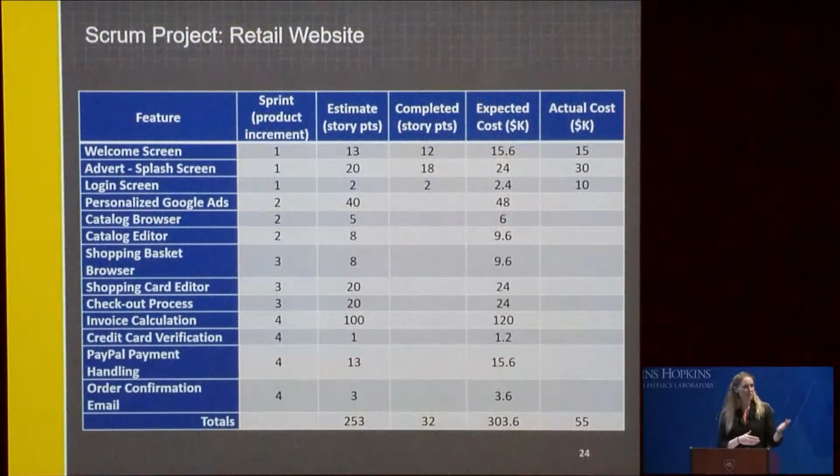Yeah, no, absolutely. And I think I mentioned this, but it's rolling wave planning, right? So I'm constantly taking the information from my sprint retrospective and I'm using that to influence my next sprint, or influence my next release and how I can do that better. So in this particular example, and I apologize, we only walked through one increment, but if I had walked through two or three increments, you would have seen that over time, I'm identifying a trend, I need to make an adjustment. Maybe my estimates are wrong, maybe I didn't give myself enough time, maybe that job is more complex, and you would see those numbers go up and down.